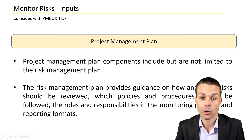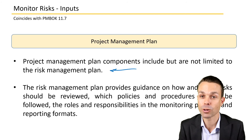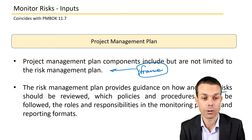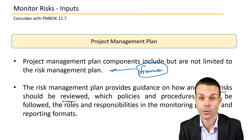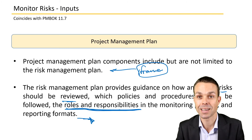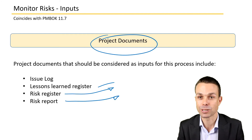The project management plan is a key input, so we're going to need the risk management plan because that was our process of how we're gathering, managing, and monitoring our risks. It's the framework that we agreed upon at the beginning, and so this is what we're using now as a guide for monitoring risks. This provides guidance on when risks should be reviewed, which policies and procedures should be followed, the roles and responsibilities of the people in the monitoring process, and any reporting formats — so how are we reporting on these risks to our stakeholders? Other key inputs will be our project documents, including lessons learned from other projects, our risk register which is our list of identified risks, and any previous risk reports shown to stakeholders.